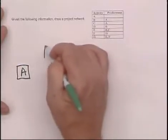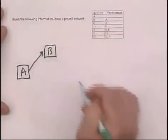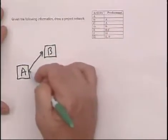As soon as A is done, B can start. And we draw an arrow to indicate that, as well as C.